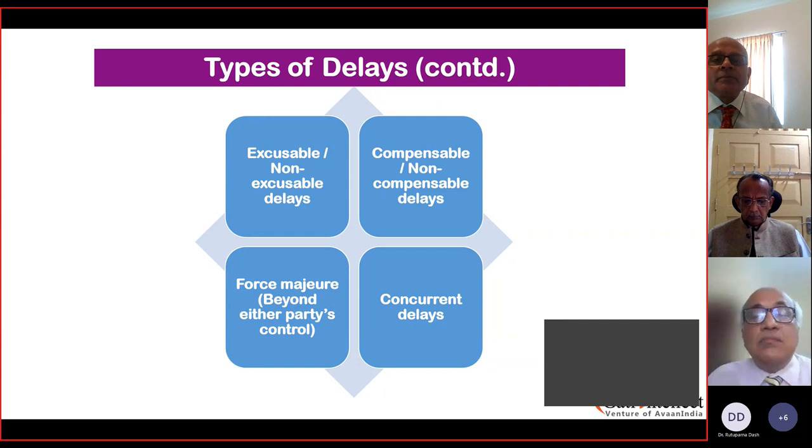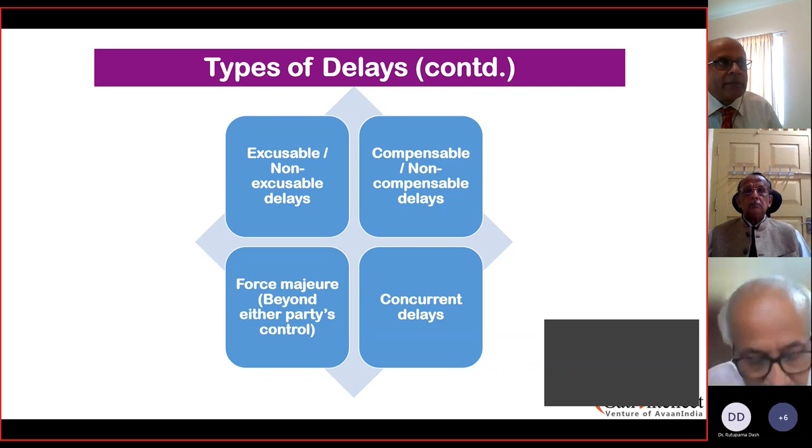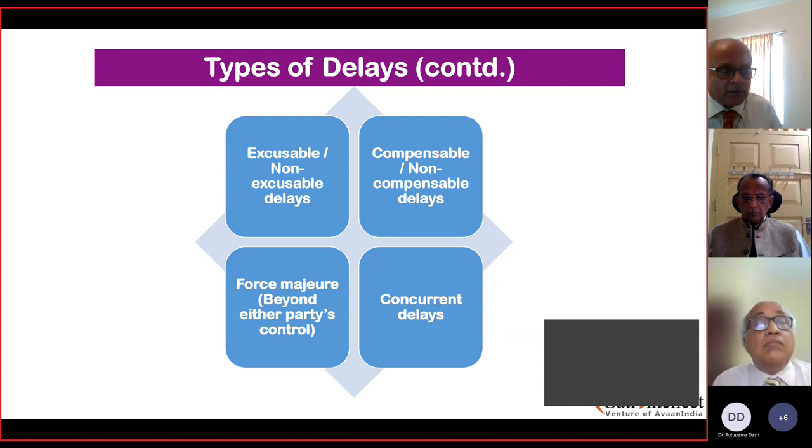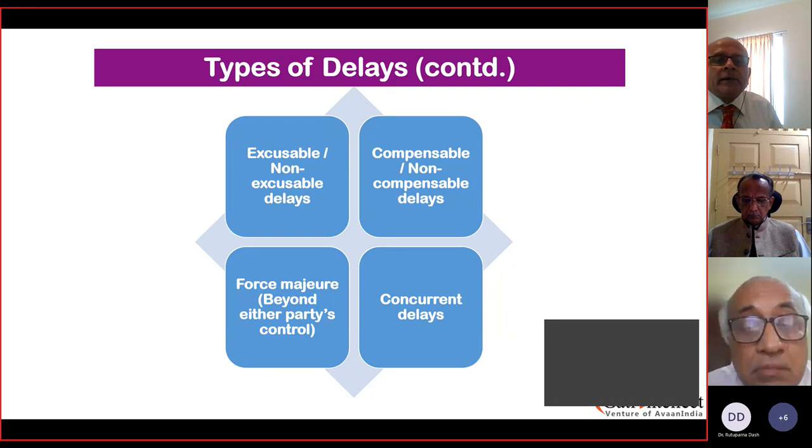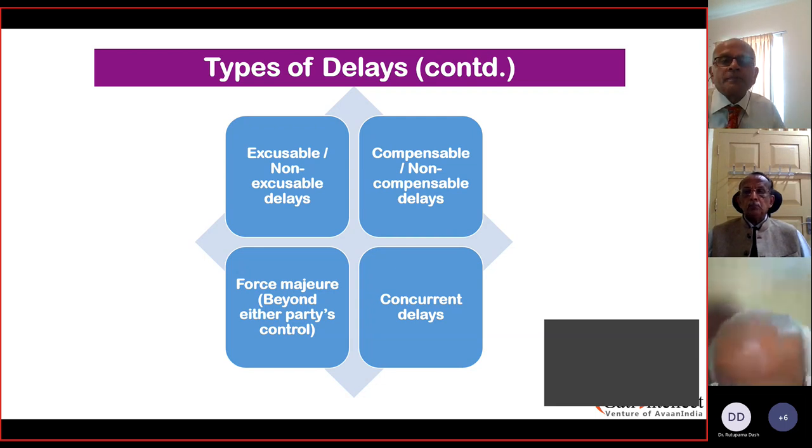Two, compensatable and non-compensatable. For some delays, there can be no compensation made on either side, either by the owner or by the contractor. The third is one which is beyond the control of either of the two parties, the owner and the contractor, which is called the force majeure delay. And the fourth and final one is concurrent delays. They happen as the project keeps rolling out also. So if we were to move ahead and look at these, Professor...